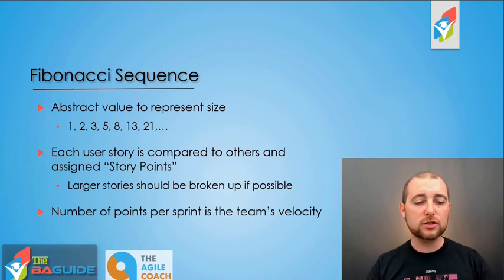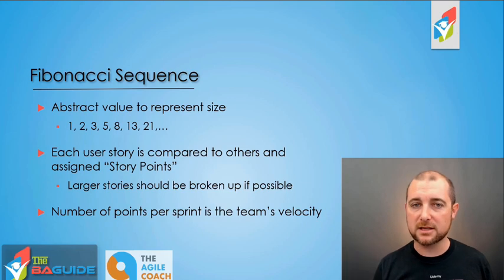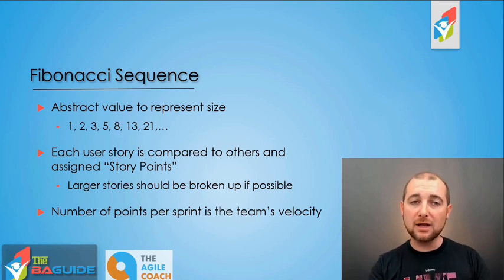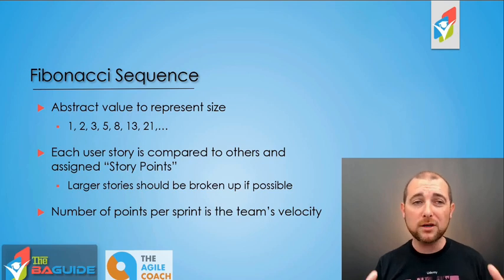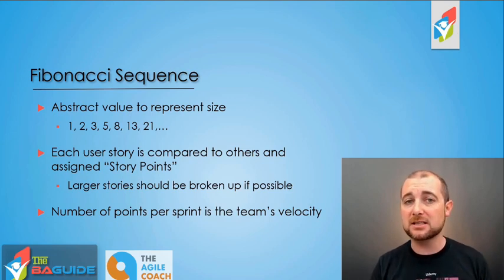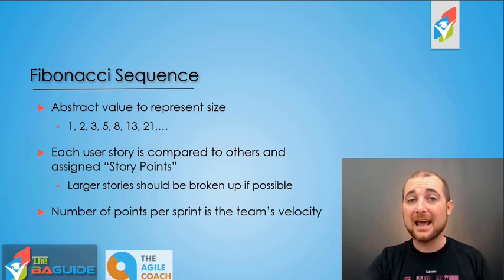Now, in the next lecture, we're going to talk a little bit more about team velocity. But with team velocities, by utilizing the Fibonacci sequence, we're able to understand what user stories we can likely get done in that sprint and have a better idea for that sprint and future sprints what we should be committing to.